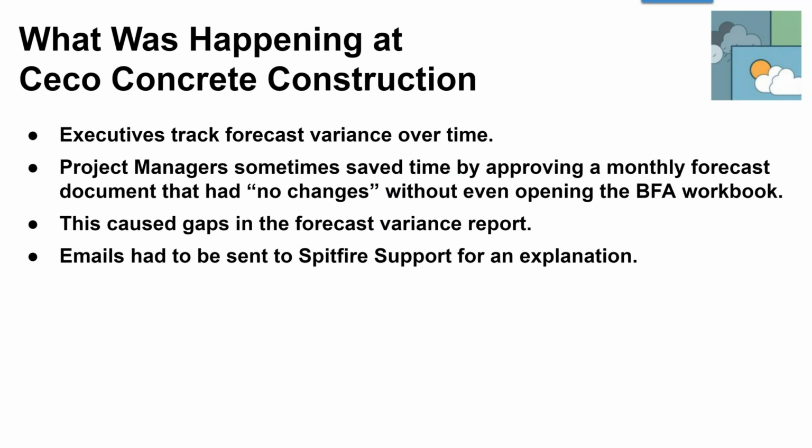So let's see. Very different picture this time, in that ongoing projects that have months or maybe even a year plus in their lifespan, there will be parts of that project, the ramp up, and maybe the shutdown part of the project, where the forecast that the project manager needs to do doesn't have a change. No change this month, nothing's going on right now.